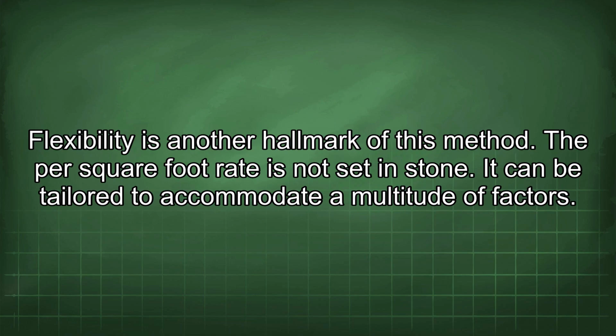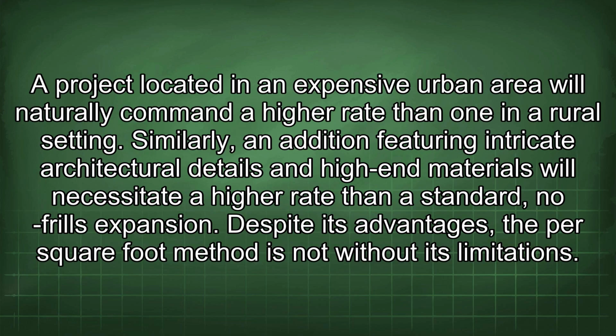Flexibility is another hallmark of this method. The per square foot rate is not set in stone. It can be tailored to accommodate a multitude of factors. A project located in an expensive urban area will naturally command a higher rate than one in a rural setting. Similarly, an addition featuring intricate architectural details and high-end materials will necessitate a higher rate than a standard, no-frills expansion.